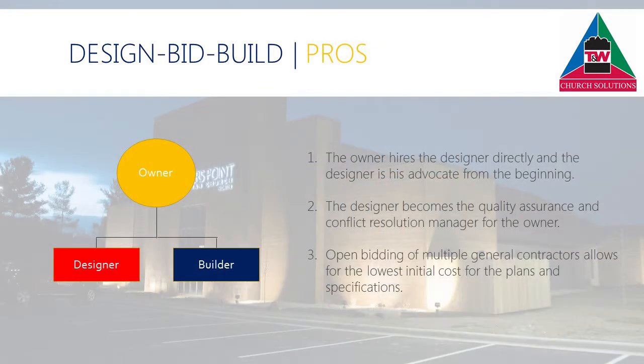The pros of this delivery system are: the owner hires the designer directly, and the designer is his advocate from the beginning. The designer becomes the quality assurance and conflict resolution manager for the owner. Open bidding of multiple general contractors allows for the lowest initial cost for the plans and specifications.